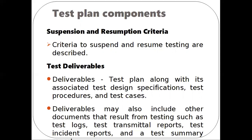The next component is test deliverables. A deliverable includes the test plan, design specifications, test cases, and test procedures. A test design specification specifies the requirements of the test cases. A test case describes the expected output based on the input and the function. A test procedure describes the steps of testing to be followed. Deliverables also include other documents to capture the results of testing, such as logs, transmittal reports, incident reports, and summary reports.